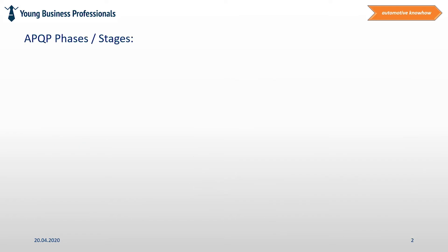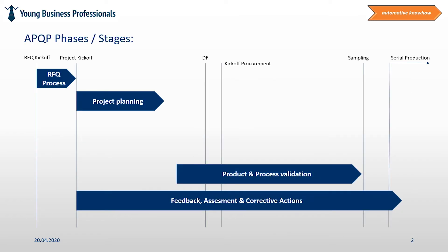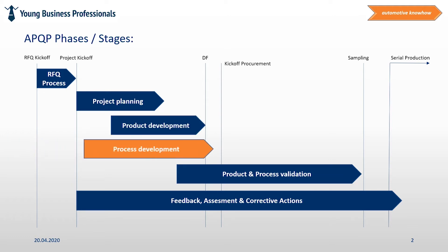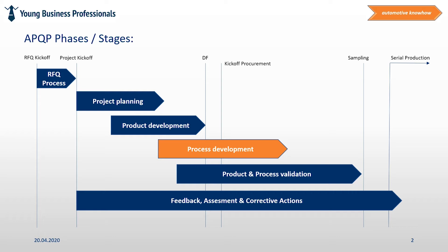What is the scope of the process development phase? In this part of the project the future production process for the product is being developed. In addition, the planned equipment is being procured and approved. This phase is starting already in parallel to the product development phase and may start theoretically from the moment at which the product design can be foreseen roughly.